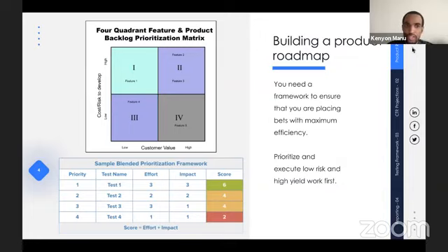Probably if it's low customer value and it's high risk to develop, I'm going to shy away from that kind of stuff. If I look at my box number 4 and I see a high value item that has a low cost or risk to develop, that's the stuff you want to prioritize first. So I wanted to talk through that first so you can get an idea of what that chart can look like. I've seen these axes inverted. It really doesn't matter as long as you are able to identify what is the highest customer value with the lowest risk or effort to develop and execute on.